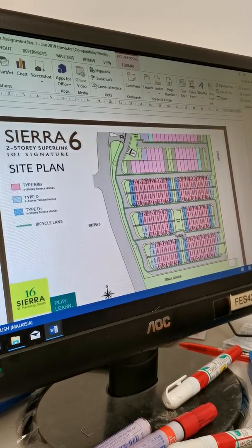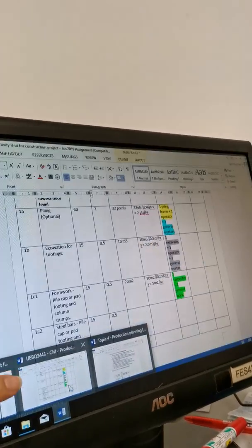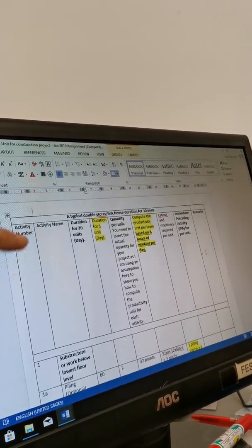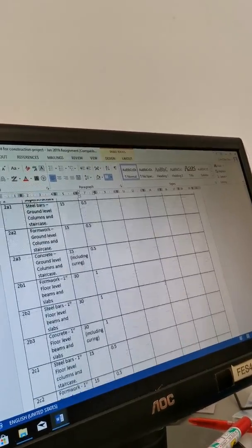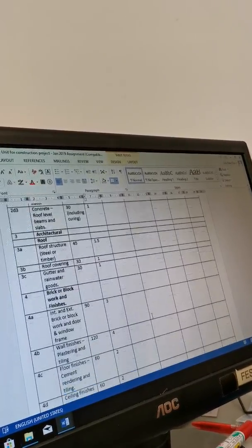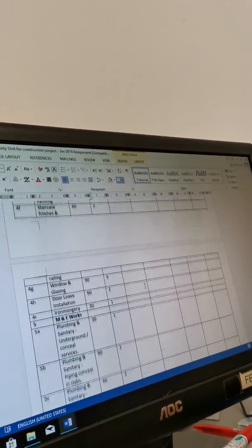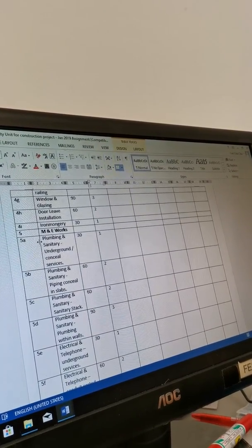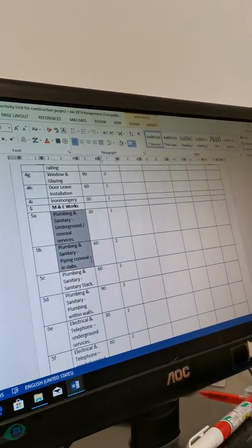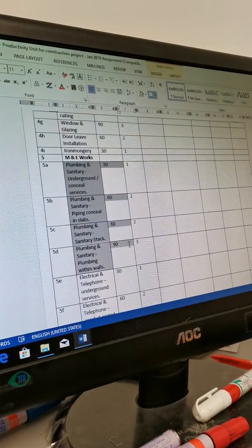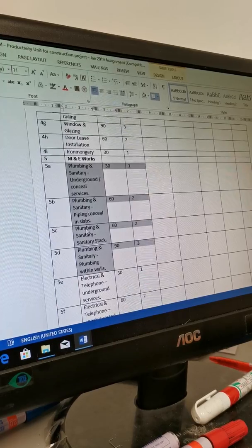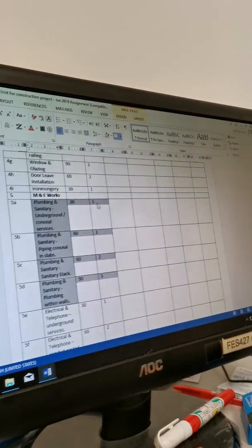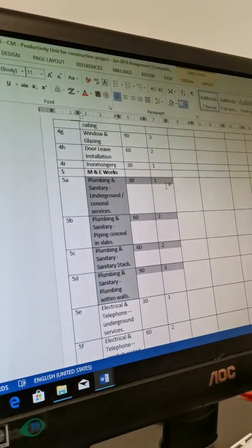Okay. Yeah. So for the IPA, if a few elements we do subcon, then for our IPA, if subcon also you need to put the subcons there like this one. For example, mechanical, or under NSCs you take this one. Let's say it's your plumbing, or under plumbing. Okay. So you can see this one, instead of those 5 A, B, C, D, you put just one: plumbing, NSCs. But the duration is here already.